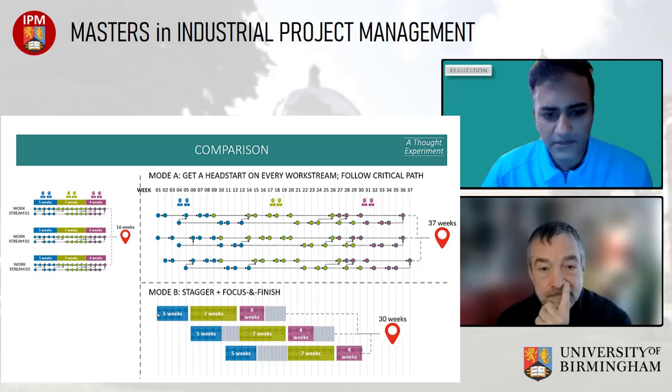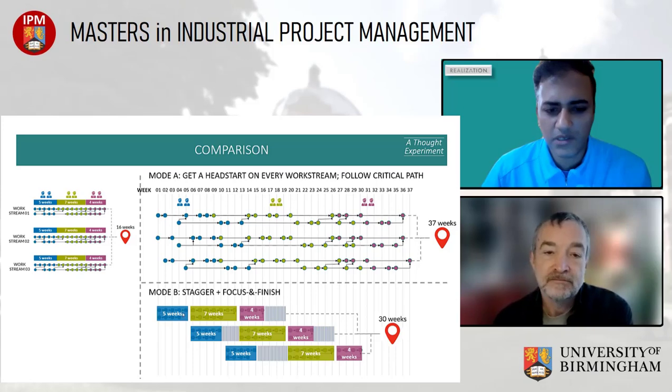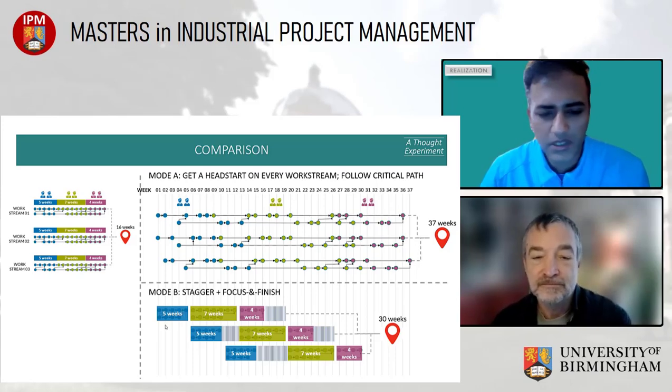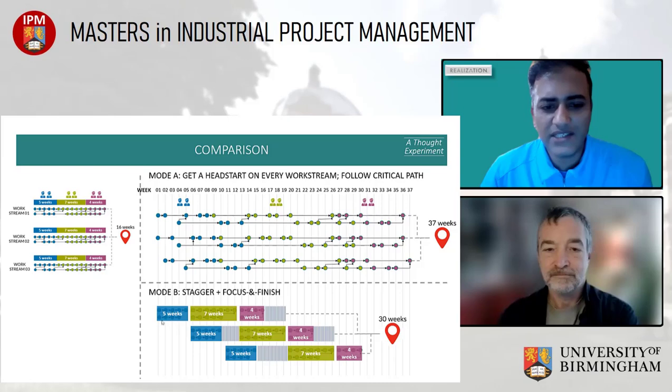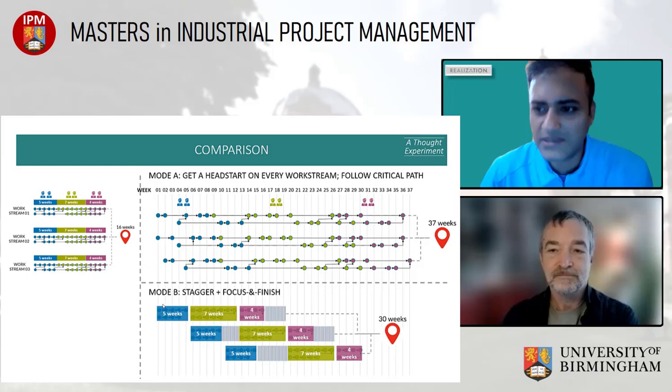Good, thank you. And just to emphasize your point, when you said it has to be managed well inside the box, it's not that we are depending on somebody to manage well. That's why the words focus and finish. This tells us that in this batch, make sure it is sort of an infinite resource situation inside the box. Across the project, we don't have enough resources. But if resources are enough for one box, so be it. That box should be without any resource constraint.